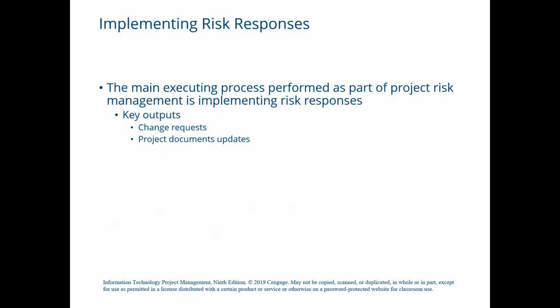For example, if we go back to our opening case, the Cliffs team had identified the risk event of having a new customer. They listed several activities they could perform to help manage this risk, such as making sure the project manager took the time to understand the customer, setting up a meeting to get to know the customer and clarify the expectations, and having Cliffs attend the meetings. So in this case, the Cliffs team was proactive in identifying this risk and would take actions to prevent any negative event from happening by implementing their risk responses.